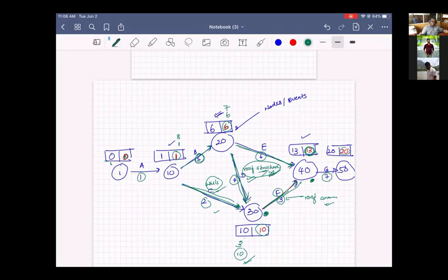You have to take the higher distance from 20 in terms of durations. So 6 or 7: here from 20 it's 14 days, this is 13 days. You have to select the higher duration from 20. This 14 is 20 minus 6. 13 is 20 minus 7. 20 is this duration, and 7 is the value that we get. Okay. So the higher distance from 20 to finish both, from backward calculations. You can think and try to understand.